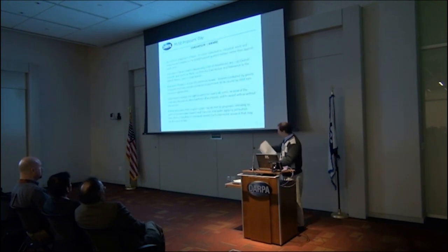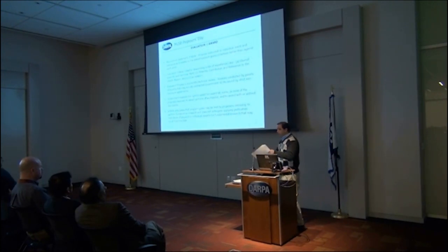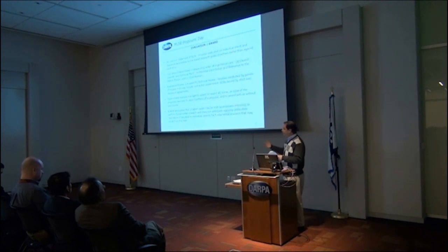Okay, evaluation and award. There's no common statement of work. We give you guys a problem set in the solicitation. Your job is to write a proposal that has a solution to that problem set, and part of that is writing your statement of work. So you're going to lay out your tasks by phase, by technical area. There's instructions in the solicitation how to lay that out.